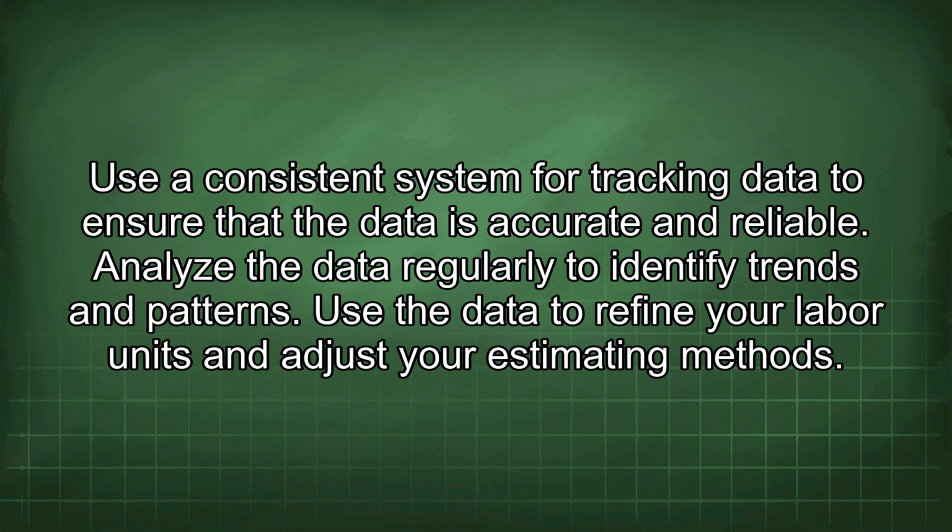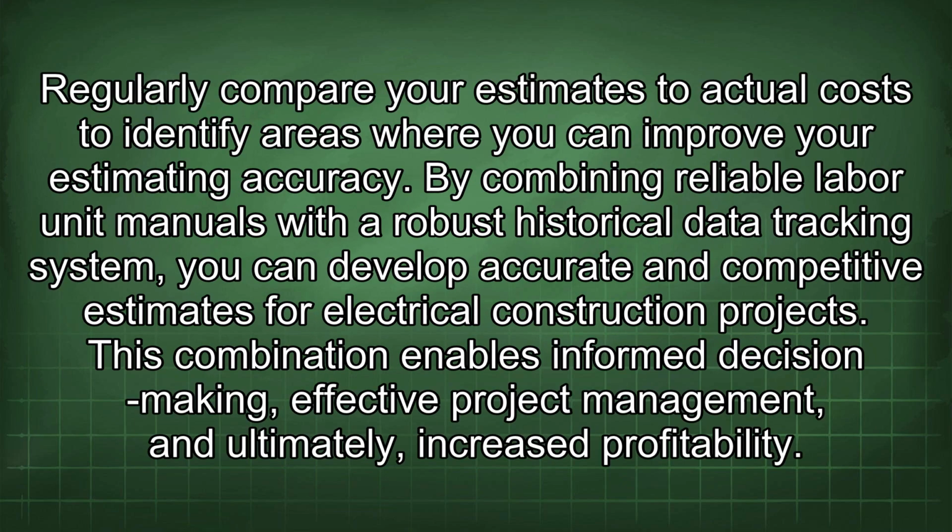Analyze the data regularly to identify trends and patterns. Use the data to refine your labor units and adjust your estimating methods. Regularly compare your estimates to actual costs to identify areas where you can improve your estimating accuracy.